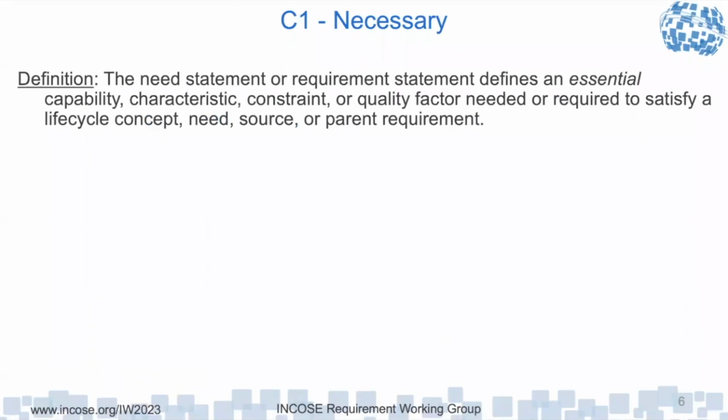What are the risks of having requirements that aren't necessary? Gold plating. Okay, so if I have gold plated requirements that aren't necessary, then what's the cost to the project? Increasing cost. Yeah, big thing, cost, and schedule. Unnecessary design space constraint for the solution. Oh yeah, that's a big one.